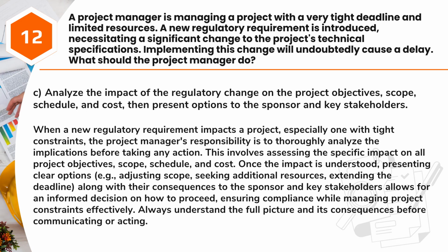Once the impact is understood, presenting clear options, e.g., adjusting scope, seeking additional resources, extending the deadline, along with their consequences to the sponsor and key stakeholders allows for an informed decision on how to proceed, ensuring compliance while managing project constraints effectively. Always understand the full picture and its consequences before communicating or acting.